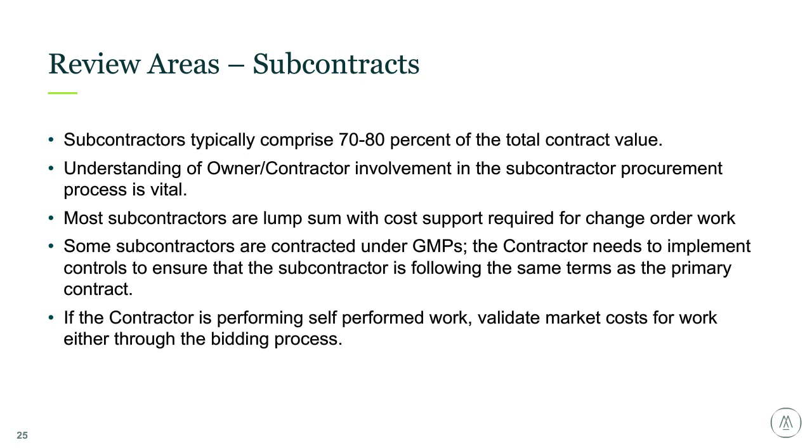That is, if the prime contract awards a subcontract themselves on a lump sum basis, there's concern, and there's not good documentation or procedures around this. There can be concerns about a lack of real bids, bid manipulation, cost shifting from the lump sum contract to the reimbursable portion of the contract, resulting in additional profit, which you didn't sign up for. So as a general rule, if the contractor is performing self-perform contract, push for the GMP type conditions as consistent with your prime contract.